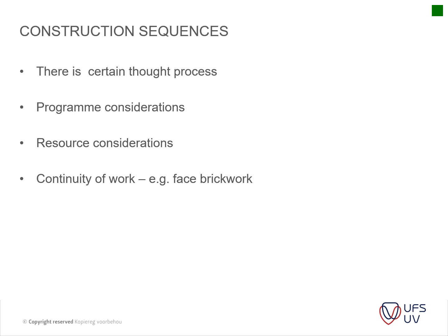The example that I always use is a bricklayer. For instance, if you sequence your work, you want to try and keep the same bricklayer on a certain section, and you want to try and finish a section within a day, to keep the signature more or less the same, so that you don't have a line of where the bricklayer started and stopped on one day, or where a new bricklayer had to come in and finish a job. You will always see that line whenever you look at the facade of the building. So those are the things that you need to look at.